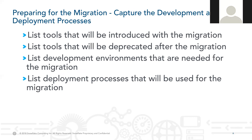Your organization may want to change your development or deployment process as part of the migration. Whether the development and deployment processes change or not, capture the development environments that will be used for the migration — for example, pre-prod or prod, dev-QA-prod — and the deployment processes, such as source control repository methods for deploying changes from one environment to the other. All of this information is critical to direct how the development and deployments will be implemented.